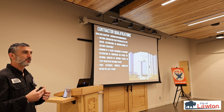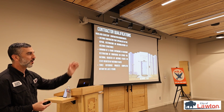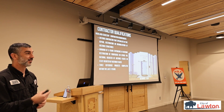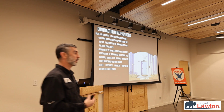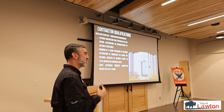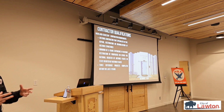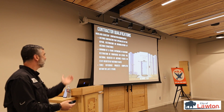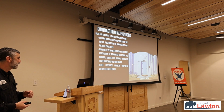because new construction has manufacturer's specifications. You're installing Hardie siding. They have a 200-page booklet that they spent several million dollars on. It tells you step-by-step instructions. And it's a very gray area in historic. So we've had to take specifications and lessons learned and then collaboration between architects and designers and all of those things to be able to figure out how we do this in a way where it's actually going to last? And then 3 references of completed projects within the last 3 years.